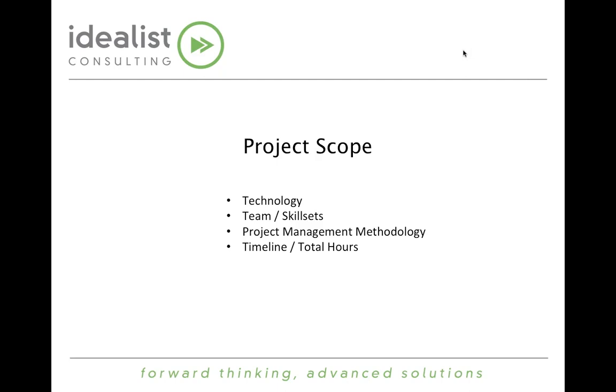Finally, the big question: how much did it cost and how long did it take? The project from start to finish took roughly 4 months, and it was approximately 400 hours. And again, I just want to put a big asterisk on that and say, I don't think that that's necessarily typical of the Salesforce1 deployment.